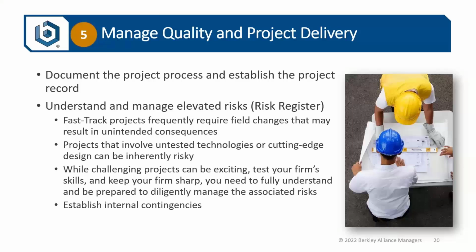So some firms establish a risk register to understand and manage elevated risks. Fast track projects, which I mentioned earlier, often require field changes that may result in unintended consequences. That is, change orders for work that's already been in place. Projects that involve untested technologies or cutting-edge design can be inherently risky as well, as I mentioned, relative to sustainable goals. And while challenging projects can be exciting, and they test your firm's skills and keep your firm sharp, you do need to fully understand them and be prepared to diligently manage the associated risks.